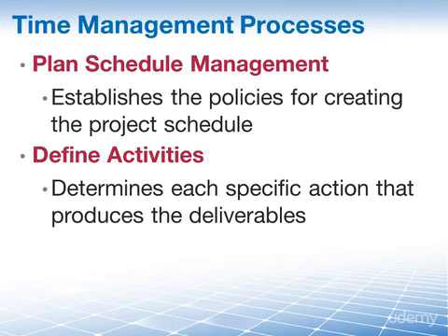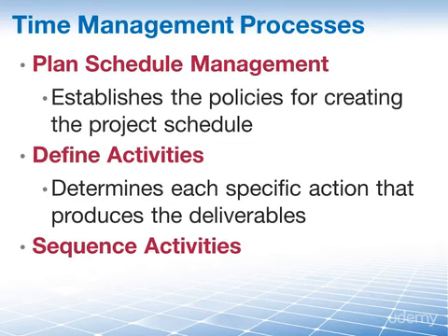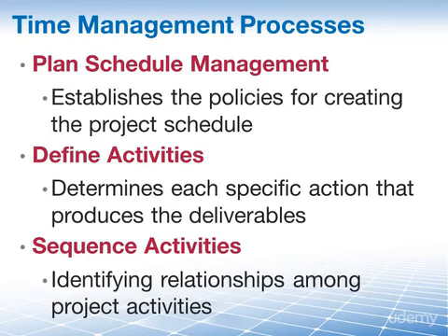Once we know what the activities are, we're going to sequence them. We're going to put them in order. First we need to dig a hole, then we need to put concrete in, etc. And that is the process of identifying and documenting relationships among project activities. So now we know what we're going to do and in which order we're going to do it.